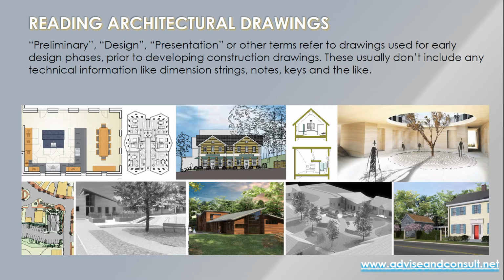So many architects, not all, but many architects will ask their clients to sign the final design drawings that are used to move on to the detailed construction drawings, because they want to be certain that the client has carefully thought through all of the design elements and then move into the detailed drawings so that there aren't a lot of changes. Changes during the construction drawings phase is one of the major bugaboos of the architectural profession.